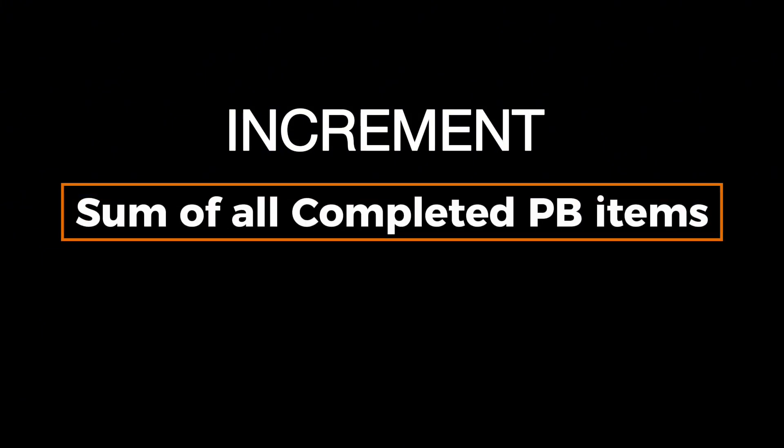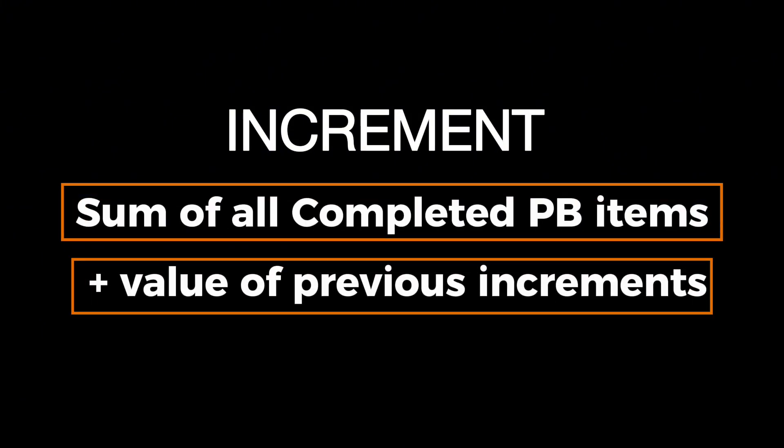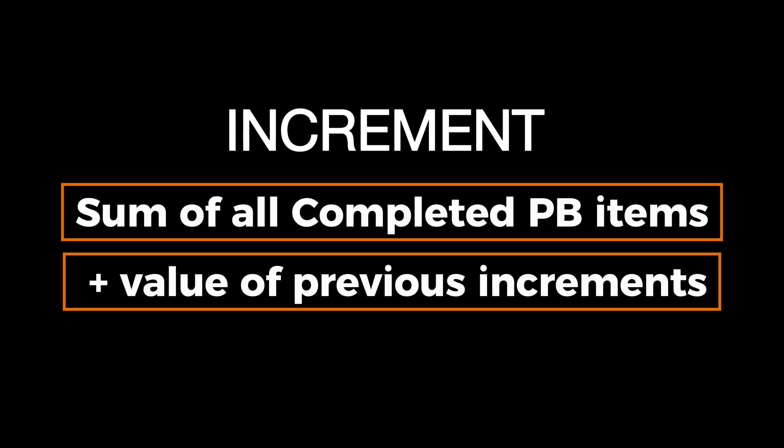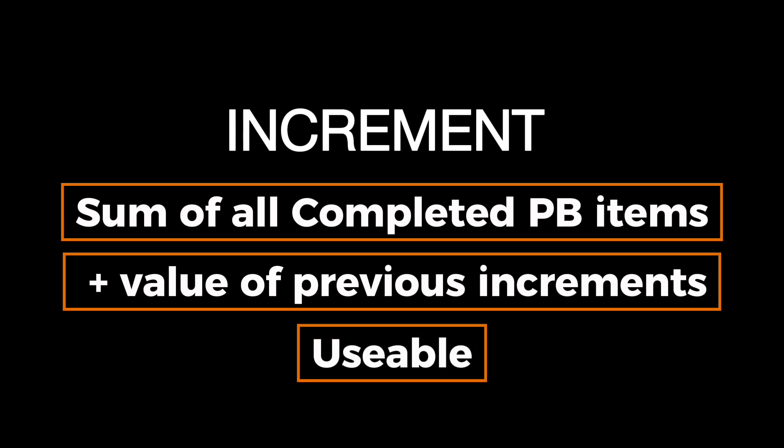Finally, the Increment is the sum of all the Product Backlog items completed during the Sprint, plus the value of previous increments. It's a concrete step toward the Product Goal and must be in a usable condition, regardless of whether the Product Owner decides to release it.